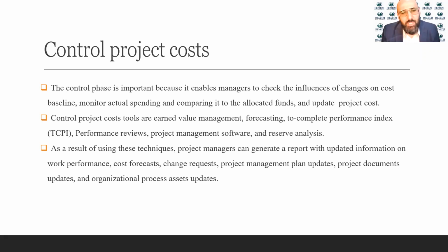As the result of using these techniques, the project managers can generate a report with updated information on work performance, cost forecasting, change requests, project management plan updates, project document updates, and organizational process assets updates. So it is important that we could compare the actual spending versus what we have planned for, and based on that, we could do the changes on the project, whether on the cost baseline or the assets or any plans that need to be updated.